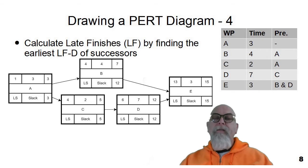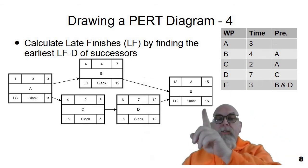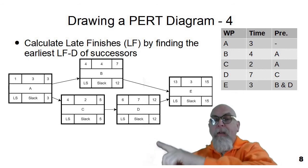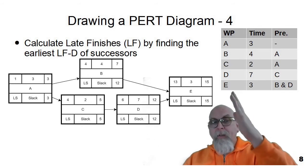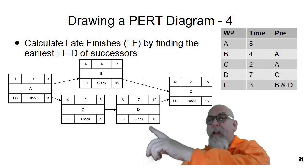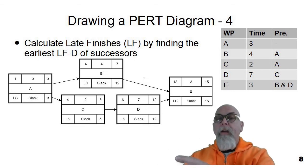To calculate the late finishes, we start at the end of the diagram and work our way backwards. So fifteen minus three would be twelve. And you see the twelve there and also the twelve up at B. Twelve minus seven would be five. You see that on C, five minus two is three. But when we do B, twelve minus four would be eight. So because we use the earliest of the successors, the earliest of the ones that come after, that would require us to take the five minus two on C and put that on A. So the late finish is three for A by working backwards through the network diagram.